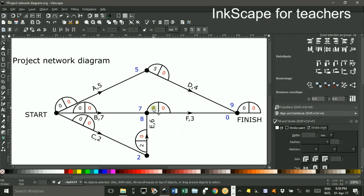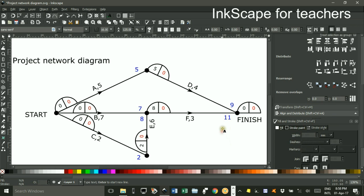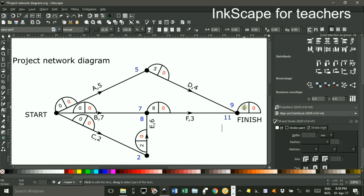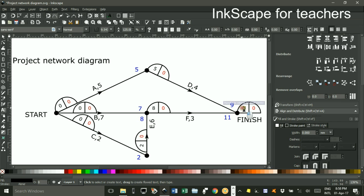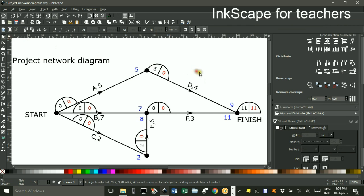Now 8 and 3 is 11, so I'll put 11 there. Now, no point, not finished if these aren't finished, so I take the maximum number. So that's an 11, and I'll mirror that at the very end. So it takes 11 hours to finish this project. But which is the critical path?